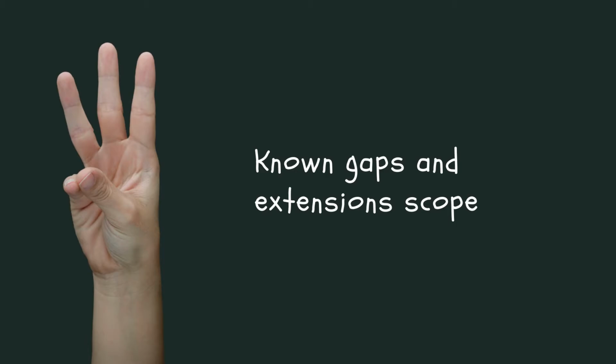Then, next, you'll want to have a list of known gaps and extensions that will be planned and included. If you don't have a clue about the gaps and extensions, then you might want to consider more analysis. It's not uncommon for a deeper analysis, phase 0 or pre-project to take place if the sales cycle was really short and did not deliver enough detail to put a project plan and statement of work, project charter, and so on in place.